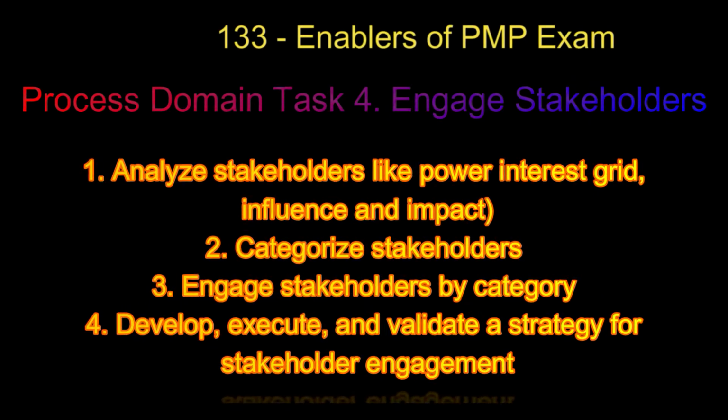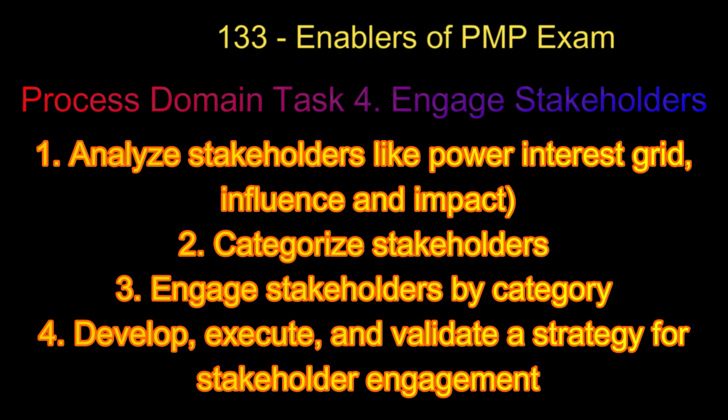Process domain task 4, engage stakeholders. This task has four enablers. First, analyze stakeholders, like power, interest, influence, and impact. Second, categorize stakeholders. Third, engage stakeholders by category. Fourth, develop, execute, and validate a strategy for stakeholder engagement.